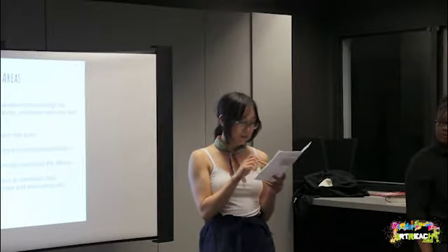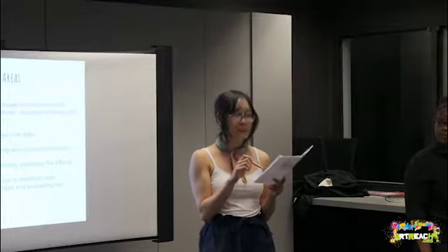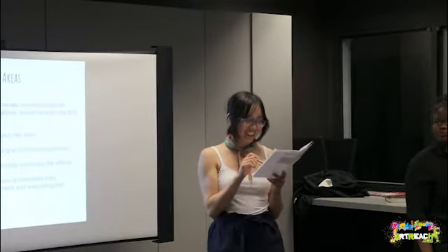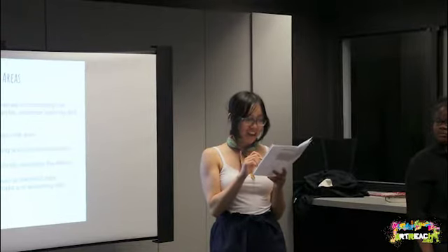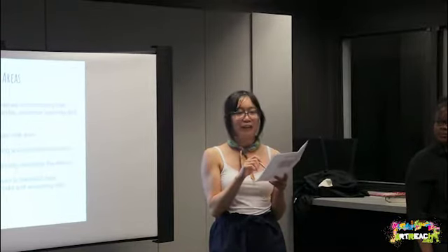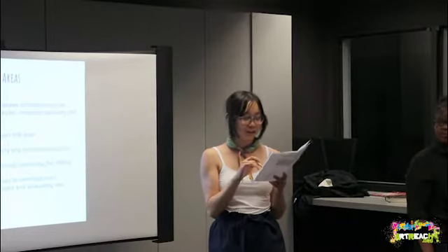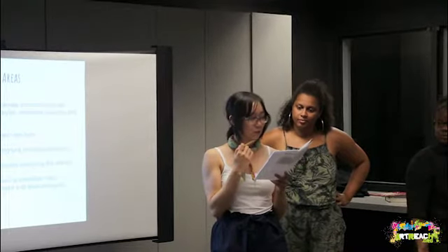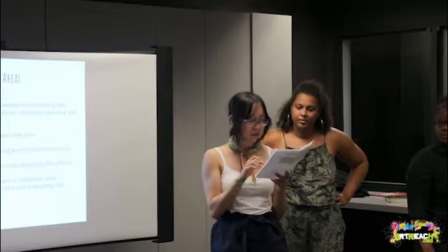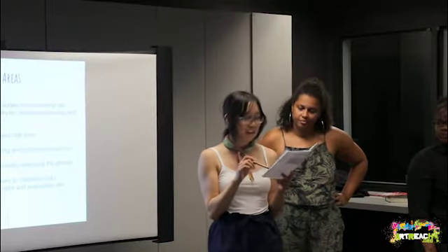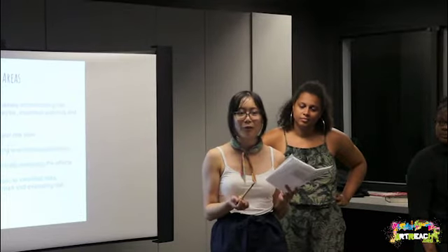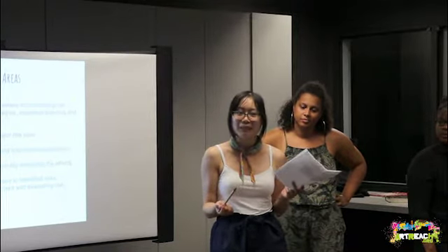For harassment and abuse charges, both of these are risk avoidance, so hopefully you never have to deal with that in the first place. So have good training for the counselors, make sure they understand exactly what those words mean and what could put you at risk for being charged with that sort of thing. And insurance. Maybe that's more risk transfer. We put that as pretty low because we've worked with the counselors before and we're pretty sure they wouldn't do anything, but you never know.